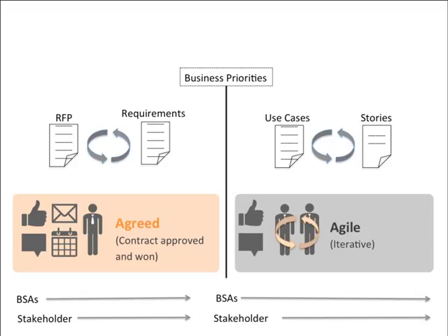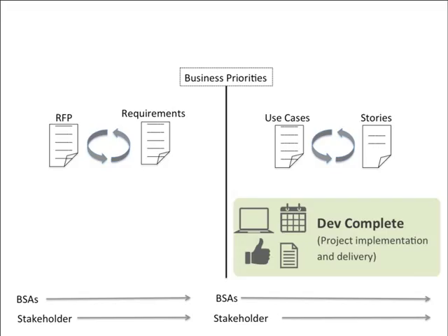And this was part of the problem because when we were down in the development cycle, we didn't have anything to really base a lot of our decisions on. So as we were finding changes in those iterative reviews with the stakeholders, we were making those changes on the fly, but we really had nothing to go back to ensure that those changes were still in alignment with either the RFP or even the business priorities. So we had nothing to really guide us in this process.